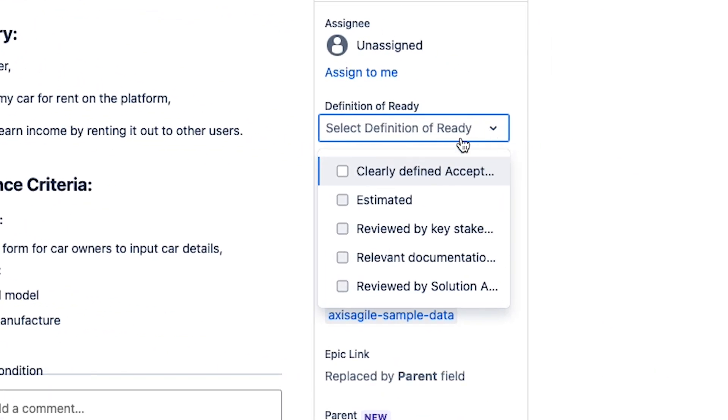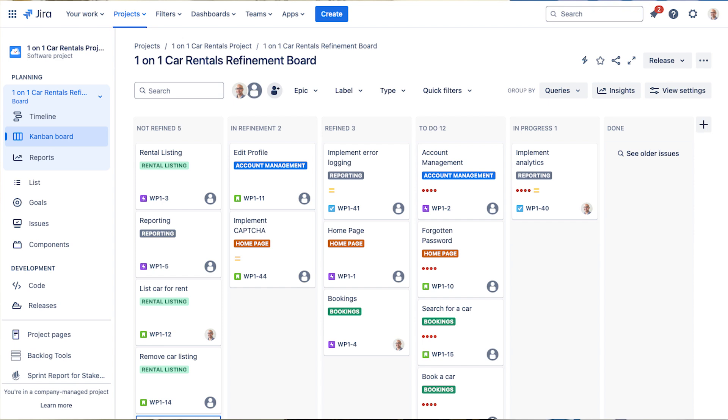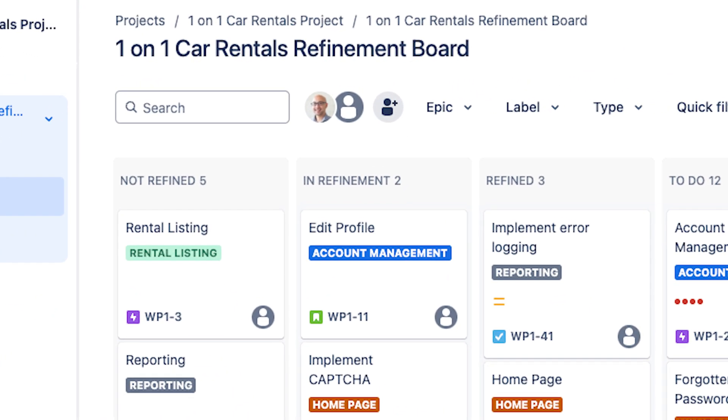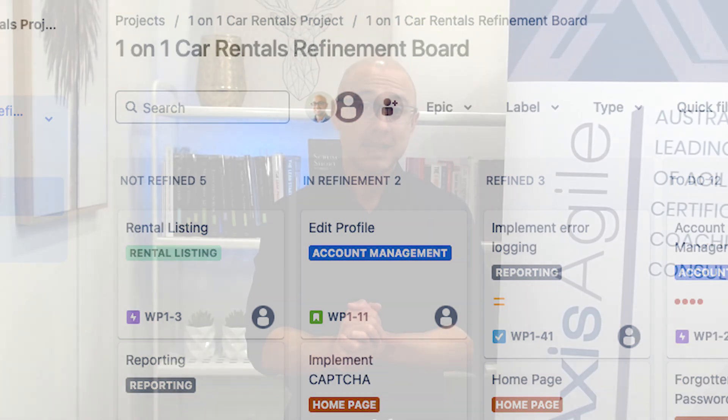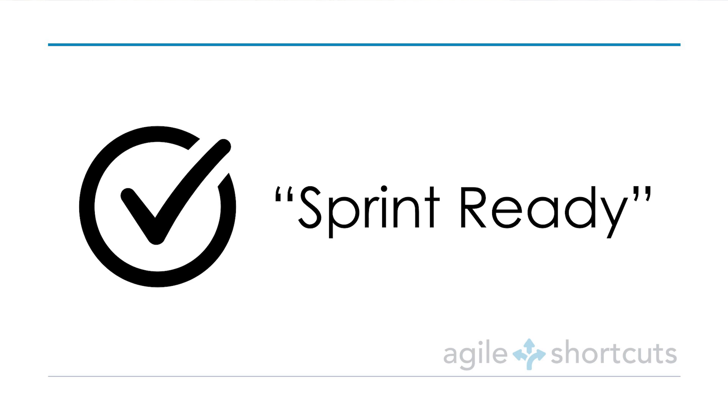There are a few quick options for applying the Definition of Ready in Jira. The first option is to use subtasks to represent the various criteria — the team uses those subtasks like a to-do list. The second option is to create a custom control, which works like a checklist where you check off each criterion. The third option is to use a Kanban board, using the columns to specify the different criteria that need to be met.